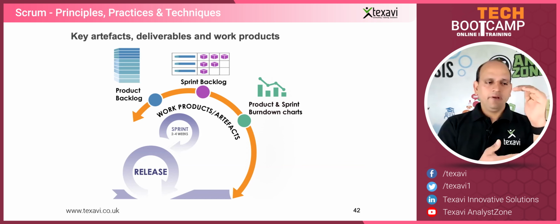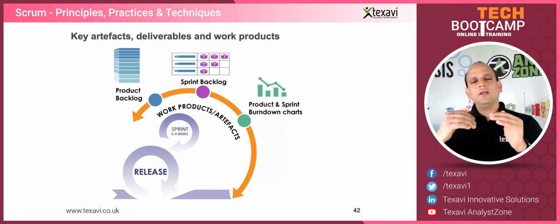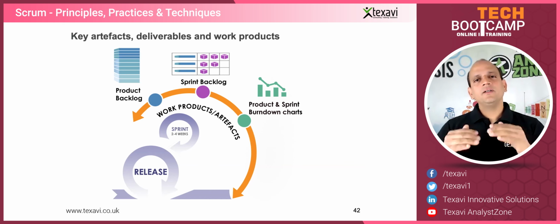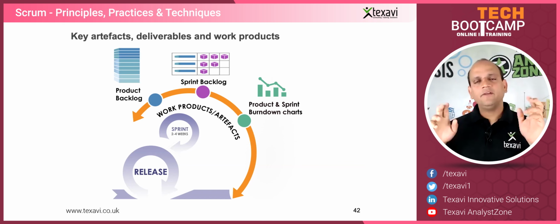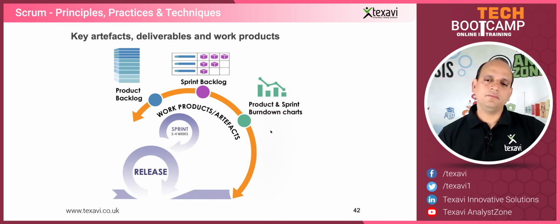Now we're at 90 story points. Day 2, 80. Day 3, 70, like that. So by the end of day 10, let's say it is a 2-week sprint with 10 days of work, by the end of the 10th day, which is the end of the sprint, we should have 0 story points. That is basically what a burn down chart is. I'll explain to you with an example there.